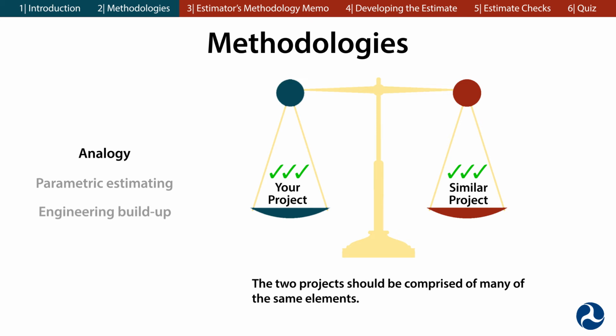The analogy method is quick, inexpensive, and easily understood. However, because truly similar projects are difficult to find, they often rely on only a few points of comparison. This method is generally used at the beginning of a project when little is known.